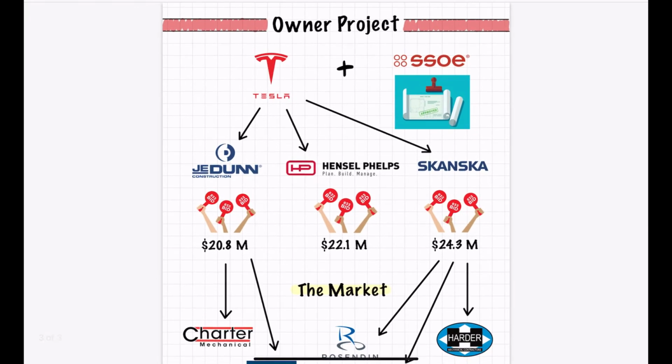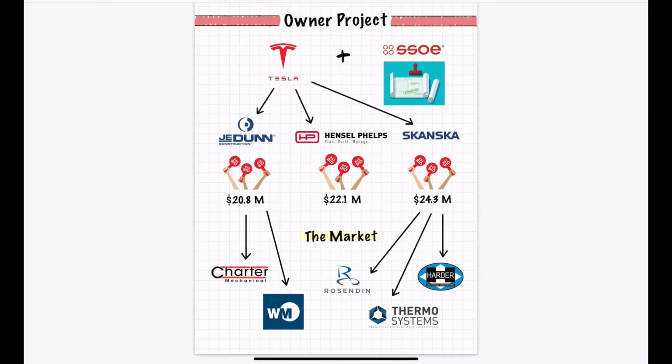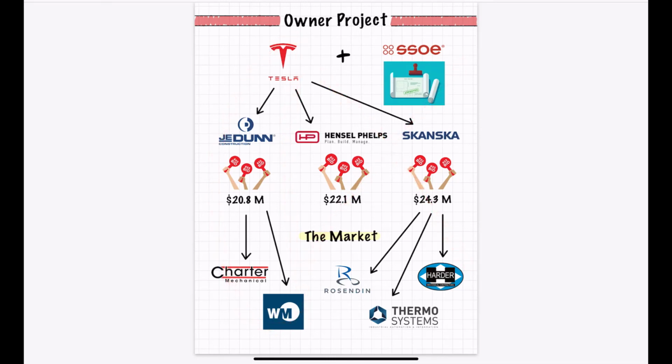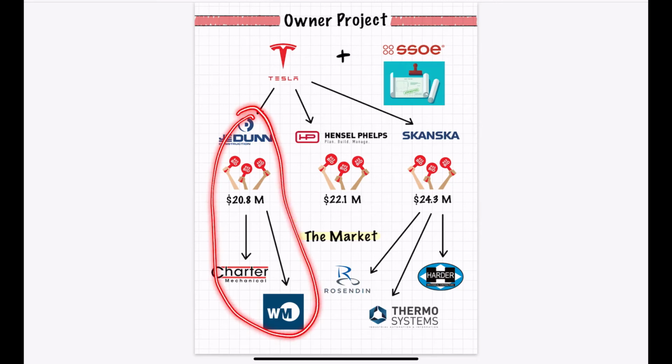They're bidded out. So what Tesla, or what an owner would do, as an example, is they would send you an RFP, what they call a request for proposal, to each general contractor, which is how things get built. And once they go with somebody, let's say they go with us, all the rest of the people will be crossed off. They won't be a part of the process anymore. And then we go and work with our trade partners and go get it built.